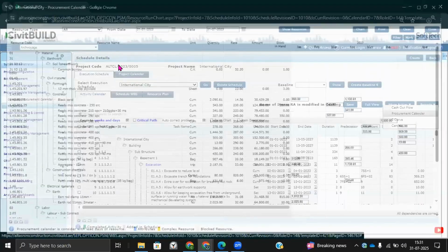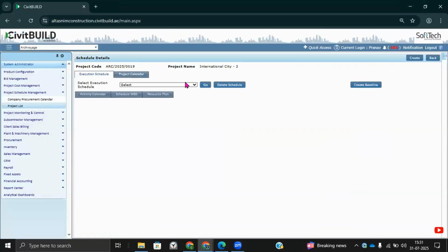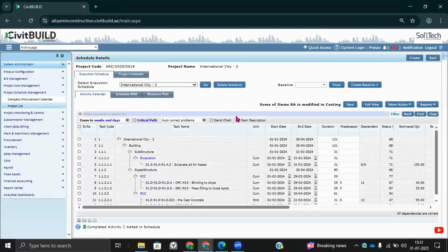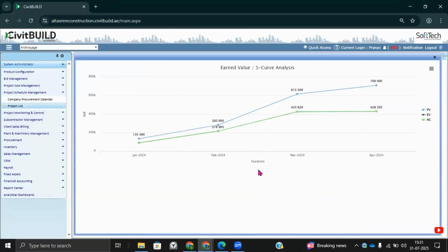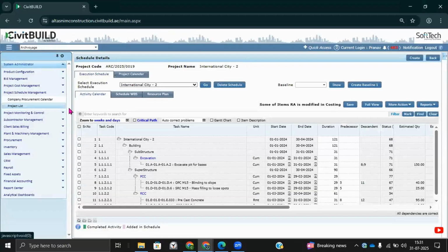Furthermore, as we have an integrated daily field report and Gantt chart view with the planning tool, you get to see an S-curve report, which will always be capable of showcasing CPI and SPI, the cost and schedule performance indexes for a project. So at any point of time, if I wish to know in which month my budget has gone over the actual cost, or whether my project is on schedule or behind schedule, I can view and access that and understand that from the S-curve report.